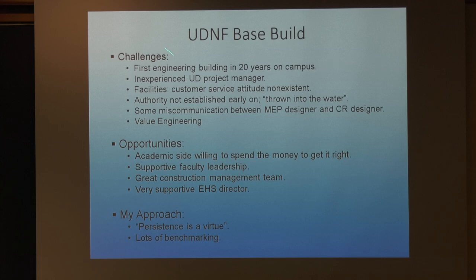Another challenge was that the project manager assigned by facilities did not have the kind of experience needed for this kind of complex building. There was no such thing as a customer service attitude. I came from Penn, and things were a little bit different there. Like I said, I was thrown into the water right away. We had different MEP designers and cleanroom designers. There was some miscommunication, sizing mismatch, and materials mismatch inside and outside the cleanroom.